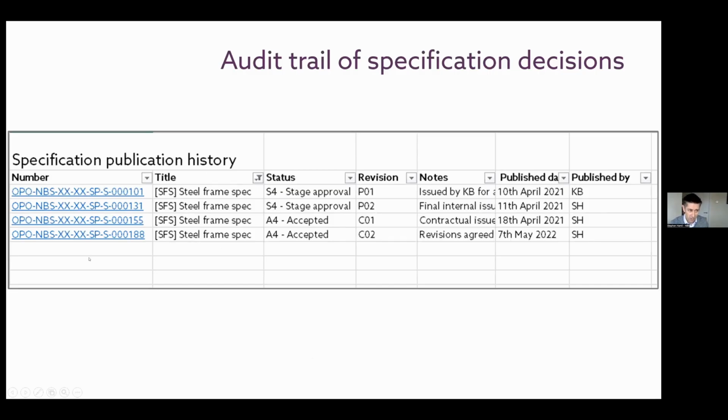And then specifications will change. They'll change at the work in progress stage, and then there will be variations through the construction phase. And it's so important that these are actually documented. Who was the person that approved it? Who was the person that issued it? Can you quickly find it through good naming convention and classification, etc.? But just like drawings, just like Word documents, specifications will change.